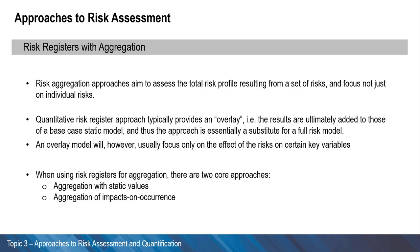When using risk registers for aggregation, there are two core approaches. First, aggregation of static values, which is typically the product of probability and impact; and second, aggregation of impacts on occurrence, where the occurrence is modeled as a risk event and the impact may either be a static value or an uncertain one.